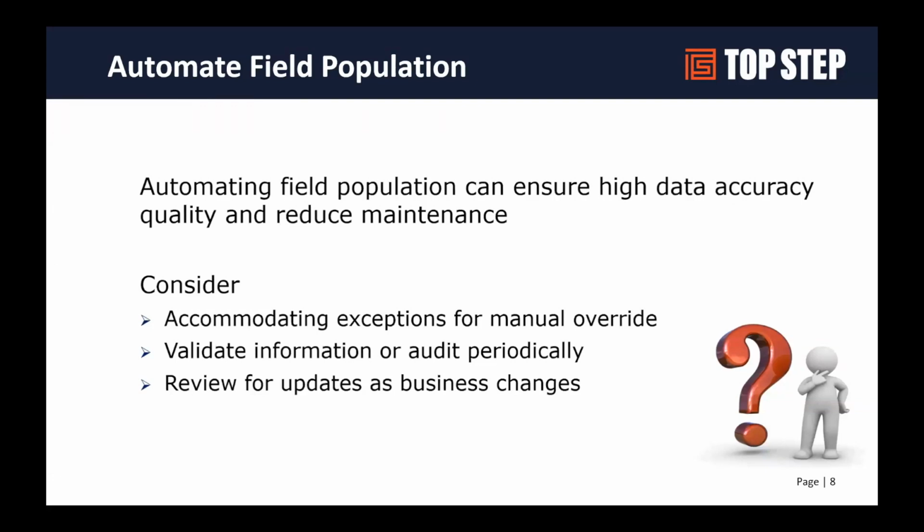So, certainly we could go in and have people manually calculate what those percent completes per project should be, but that would be fraught with potential error and be very time consuming. We do a script that goes in and calculates what the percent complete should be and stores it in a custom field. And then we've also allowed for exceptions. We had a customer recently that said, yeah, I know it says it's 80%, but we're actually done. We want to ratchet it to 100.